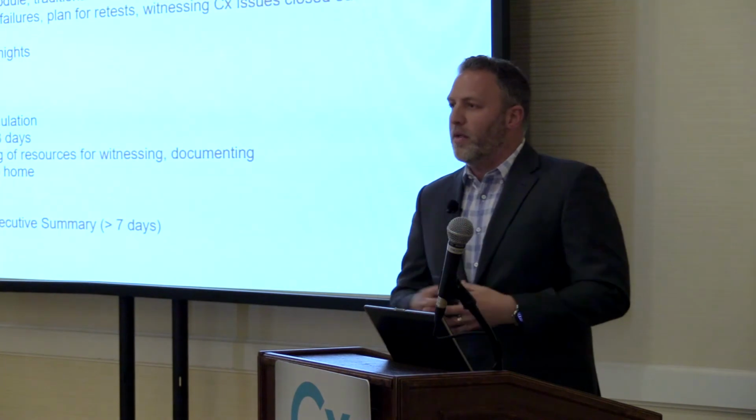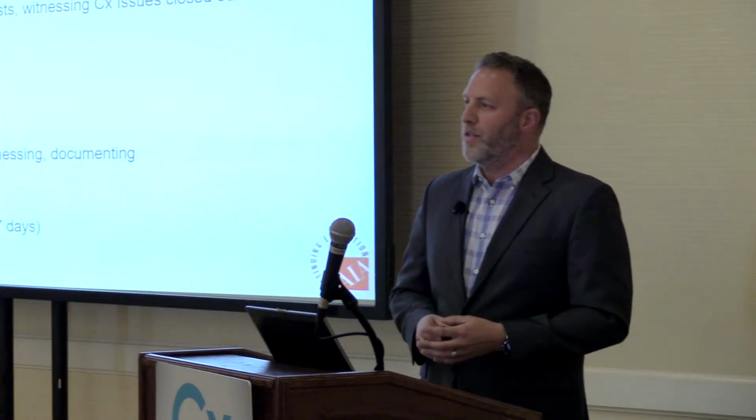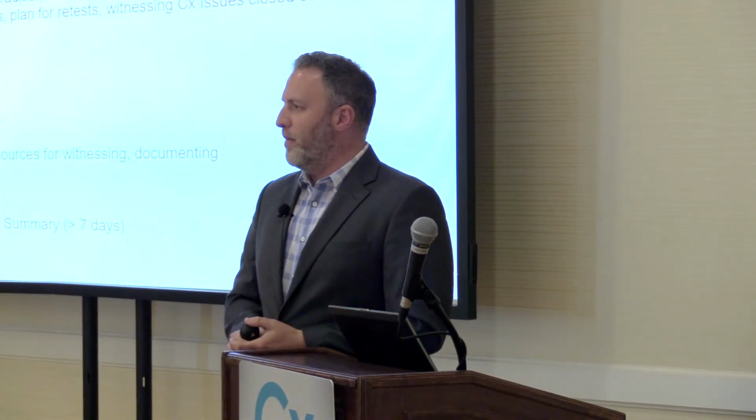Then actually do your level 5 testing. You're going to go through all the critical failures of components. You're going to test your N plus whatever capacity, N plus 1, N plus 4. You're going to start failing equipment. Then you're going to do the same thing on your electrical side.